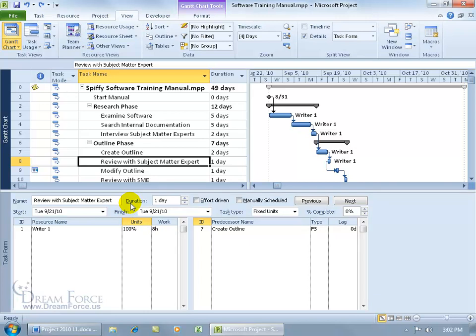The duration time field is for the task — the amount of time it is going to take to complete the task. For example, reviewing with subject matter experts is a total of one day. The units and work are for the resources. The units are in percentage, representing the hours that resource will work each day on the task. 100% is 8 hours, 50% is 4 hours, and so forth. So after assigning a resource, do you need to adjust any one of these three time fields?